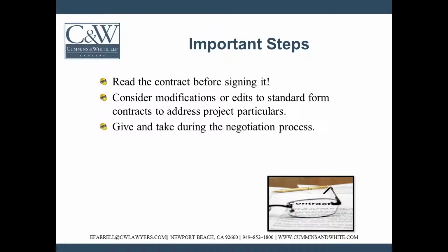Standard form contracts especially require modification to identify or acknowledge certain facts. For instance, any time constraints to a scope of work or any special situations on a project. These modifications can also address special circumstances. For instance, any restrictions on subcontracting or materials.